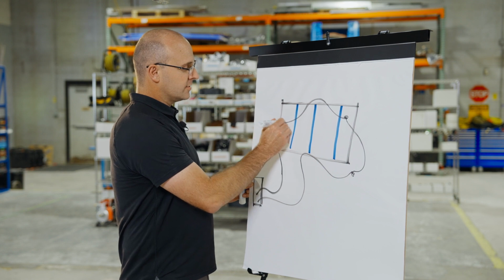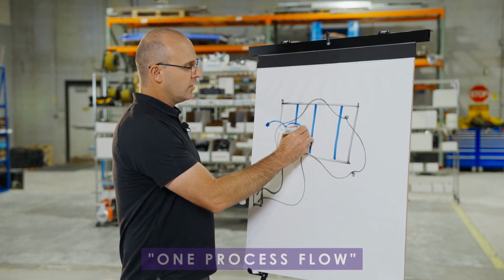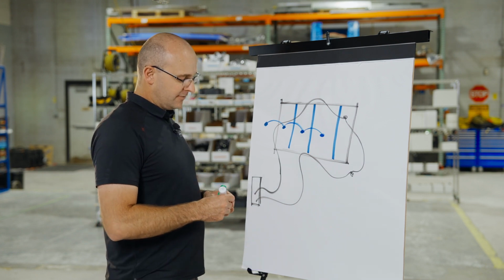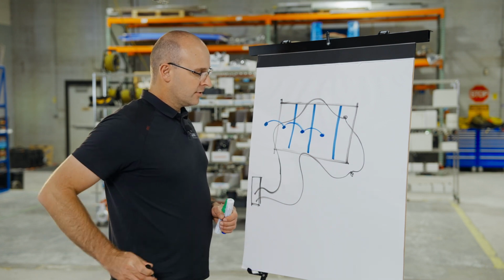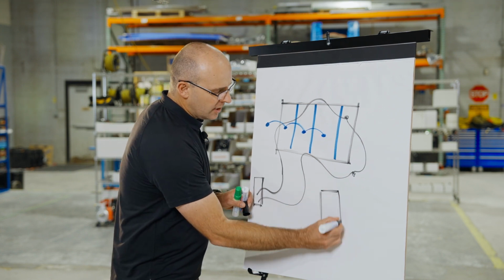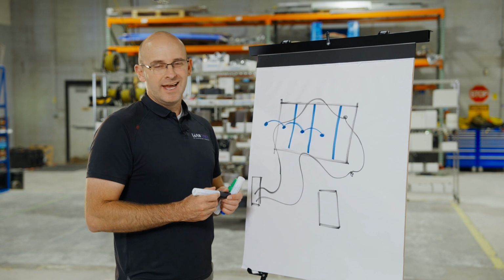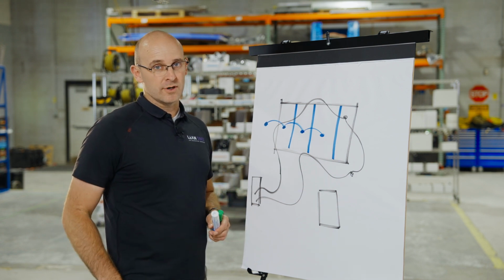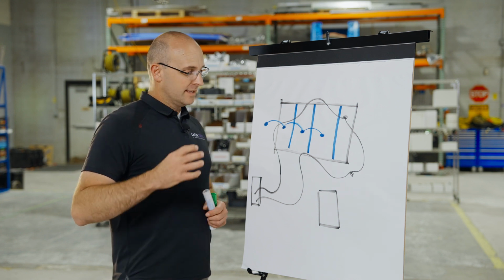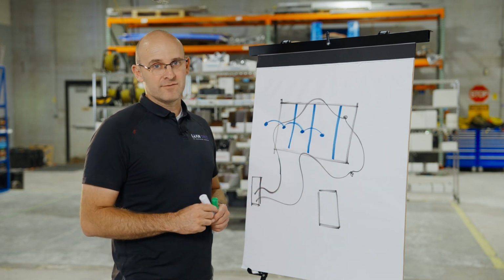Trades are going from zone to zone in what's called one process flow. What that means is that if you have the zone, and I'll draw it right here on the bottom, a crew should not just approach that zone as just a normal part of doing their work. They should look at it like a piece or a process that they get that's isolated from the rest.